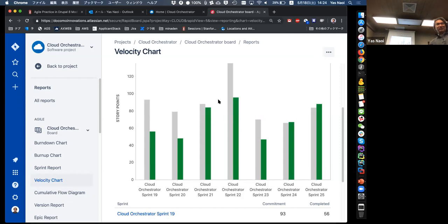So we will probably break it up. Yeah, we need to break it up. Basically, our standard story point is 5 or 8. Yeah, we don't know. And when I learned about Agile and Scrum, I didn't like that because it's not scientific, not like an objective measure.